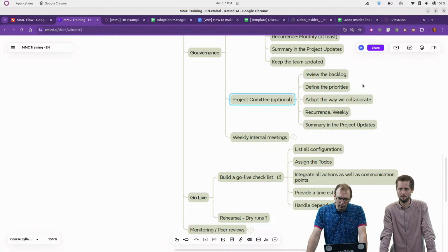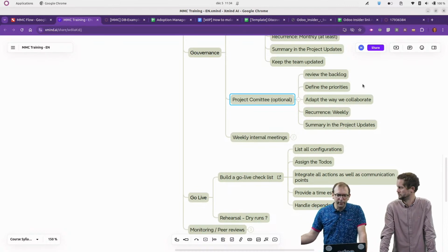In that case, what I usually do is plan a sprint later on for all those tasks so that we put them on the side. We focus on the implementation that was decided during the ROI, and for all those small things we can take the time to rethink them and decide if we implement them or not.